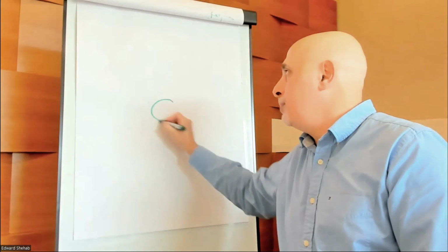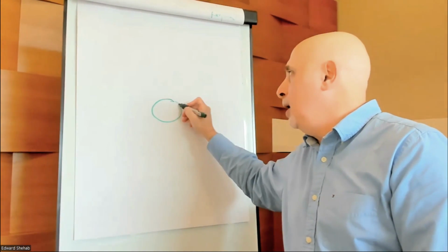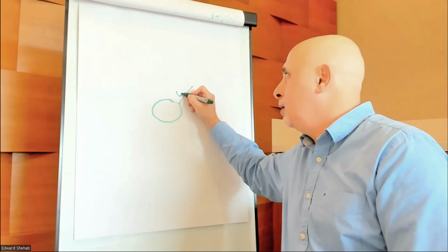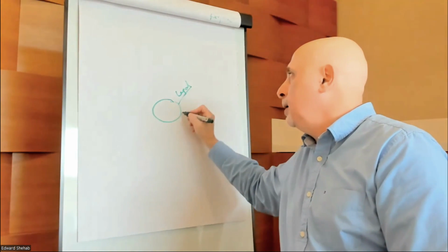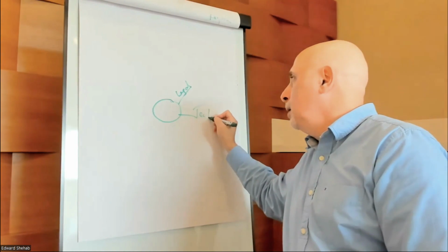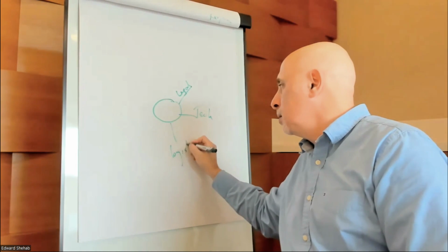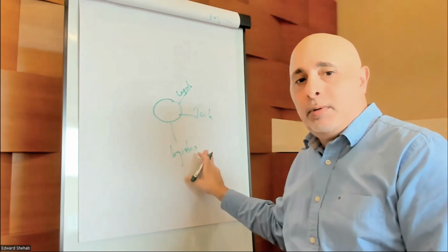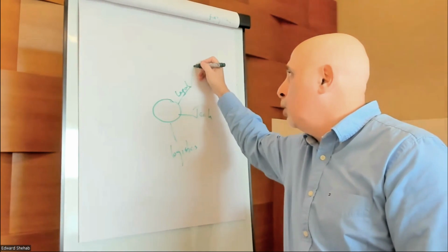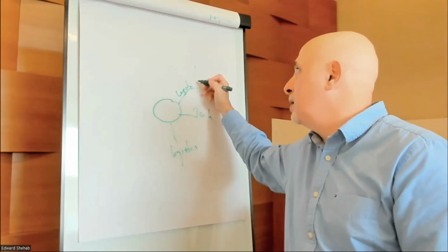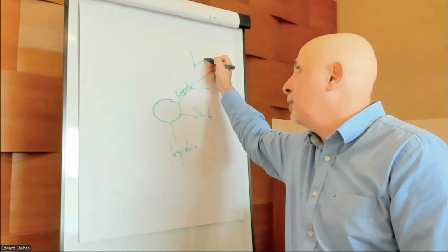You could also use mind maps. Let me show you here with a mind map. So you write your project here, and then you can branch it out. So you can say legal matters, right? And then you can say technical. You can put logistics. So you write these things here, and then legal will branch out to maybe 2 subsets or 3 subsets, and this could branch out like that.